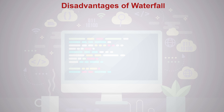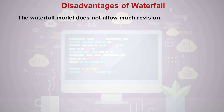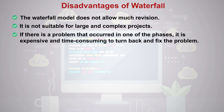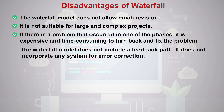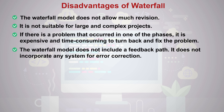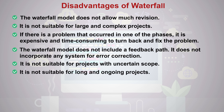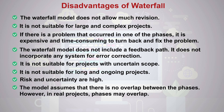Disadvantages of the waterfall model: it does not allow much revision and is not suitable for large and complex projects. If a problem occurs in one of the phases, it is expensive and time-consuming to go back and fix it. There is no feedback path, no system for error correction, and it is not suitable for projects with uncertain scope or long, ongoing projects. Risk and uncertainty are high, and the model assumes no overlap between phases, though in real projects phases may overlap.